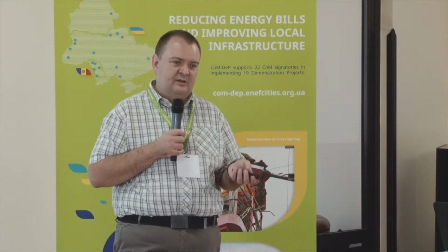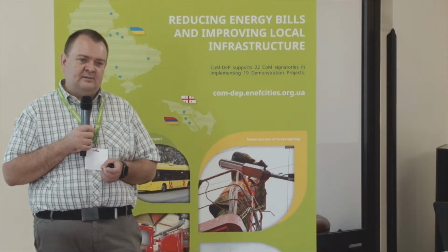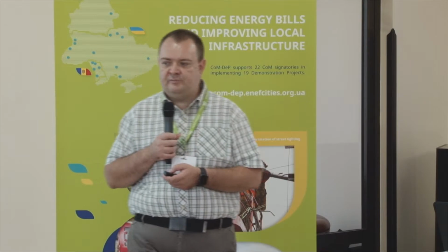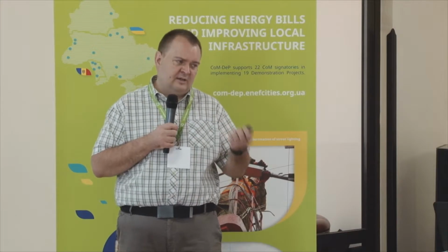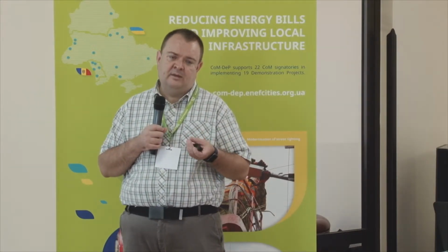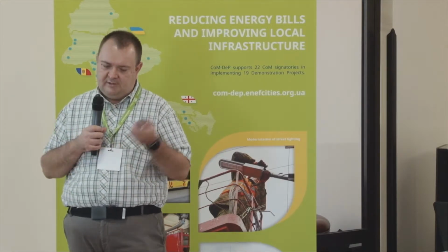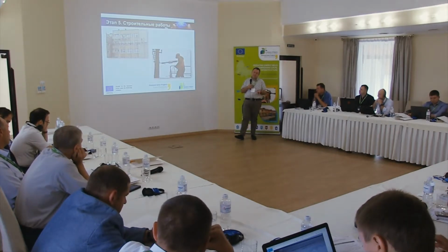So if you do not include into the contract the duty of the contractor to submit weekly reports, then definitely you cannot expect those reports from him because it is not mentioned in the contract. So mind this stage is really important and requires lots of work on your part, and in some projects we even have specific experts regarding legal or legislative issues, and hiring such experts and procurement experts is important